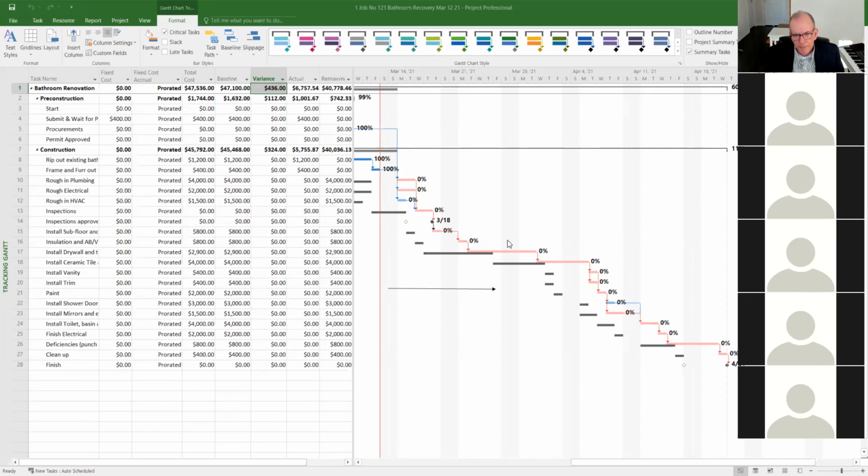So that's the D. Because it doesn't help us to shorten this one, right? Well, number one, how are we going to shorten it? It's only one date, but on a real bigger schedule, shortening that's not going to help us. It's not going to shorten the rest. So I've got to look along the critical path.